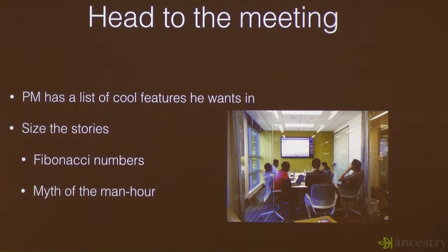And so you build up these story points and the PM says, okay, so-and-so's on vacation. There's 2 days of this conference you guys are going to. So we really only have about 30 story points to spread around. And so you go through all the stories and you put points to them. And the PM decides which ones are highest priority for him, and he pulls them over.